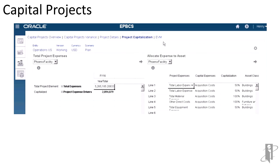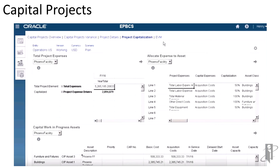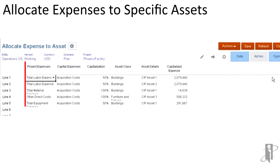For capital projects, I'm actually going to be creating an asset — it's something I'm going to depreciate. Maybe I can capitalize the full cost of the project, or maybe just some portion of it, and maybe there's something I have to take as an operating expense. I can determine what portion I'm capitalizing as well as the length of that capitalization. I could say that certain expenses are going to be directly applied to specific assets — maybe all the Java effort creates a new Java application that I can depreciate, or maybe different people are working on a building versus the landscaping, and I could depreciate those separately.